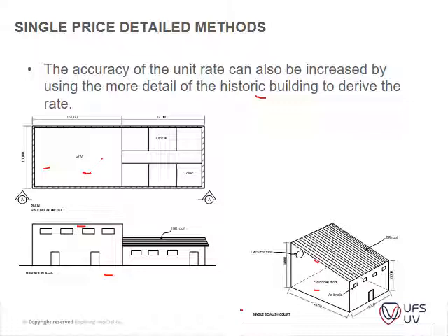So you took this section and the construction of this roof, and applied it to the installation here. Although you can see that this was more a double pitch or gable type of construction, which doesn't really work out the same as this new development. So what I would have done is lowered the rate slightly to accommodate for this. Then you can take that information and use it like that. There's a proper example of this that we're going to look at as well. So this is the story enclosure method that we usually use.